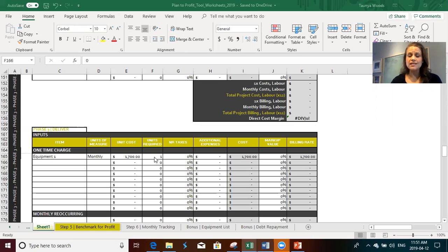And bookkeepers don't. This really does fall to the business owner to figure this out, because we then go to the bookkeeper and say, I need you to start accounting for costs in this way, in these categories, so that you know you're staying on track with each project. It is also very helpful with your team, because now your team is accountable. If they said it was going to take 30 minutes to do the proposal, they have to get the proposal done in 30 minutes, right?